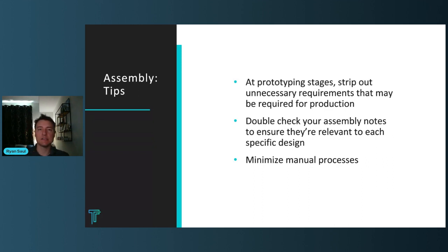The consequences of manual processes are lower yields in general. Lower yields mean less certain delivery timelines, potentially expediting requirements. So anything you can do to minimize manual processes.